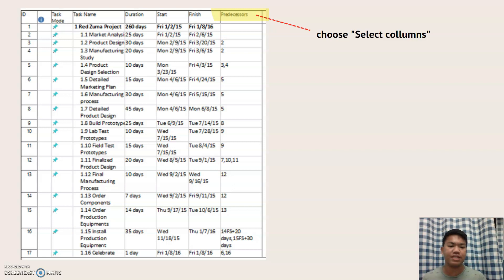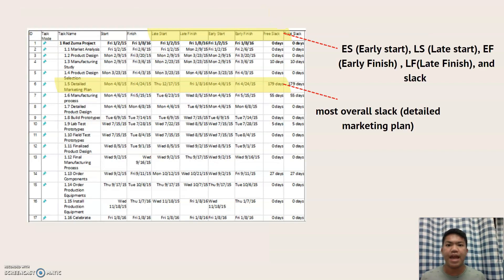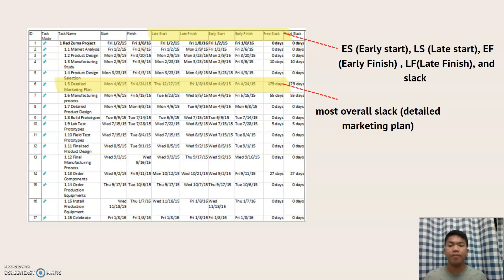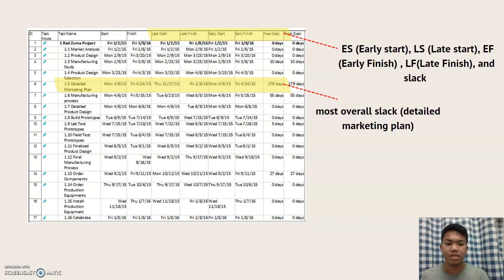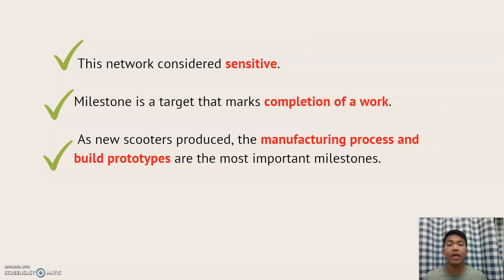By double-clicking the predecessors and choosing Select Columns, we can create our own columns for ES, LS, EF, and LF. From this figure we can see that the most overall slack belongs to the detailed marketing plan, which has 179 days of slack.